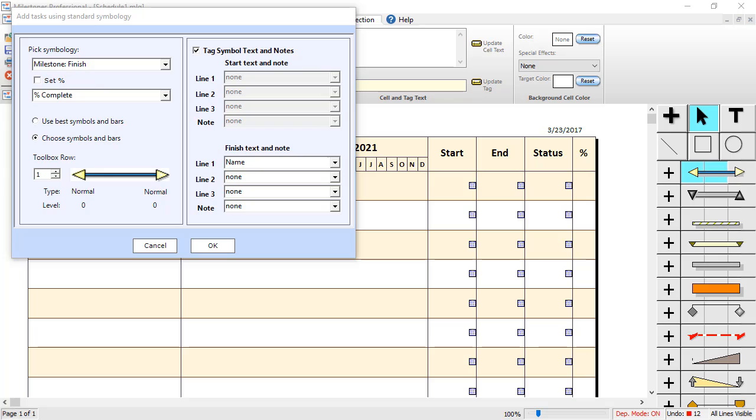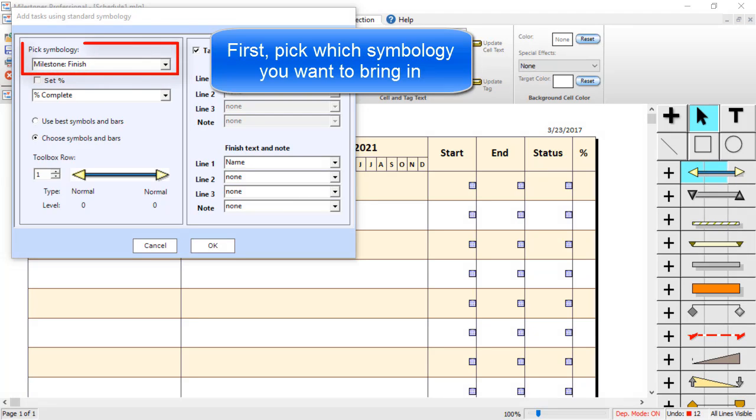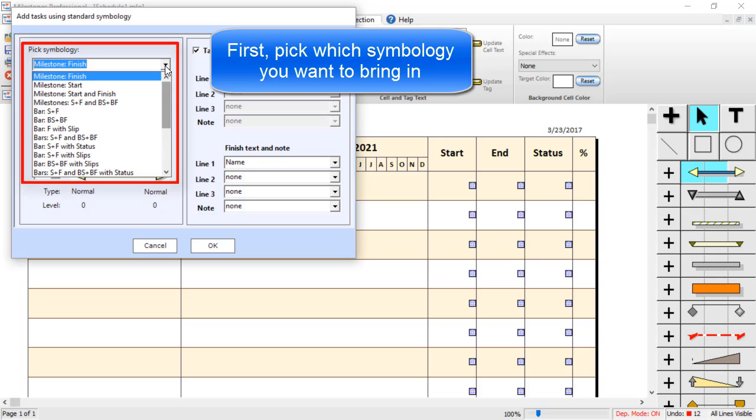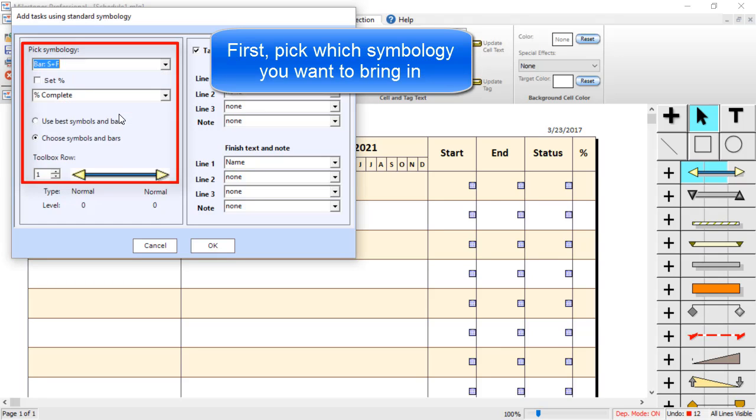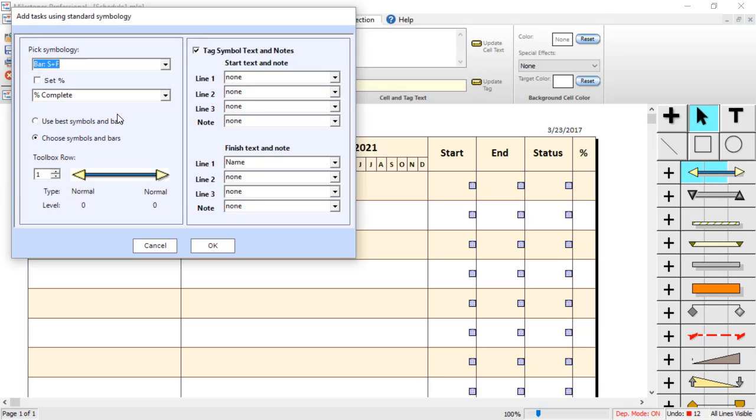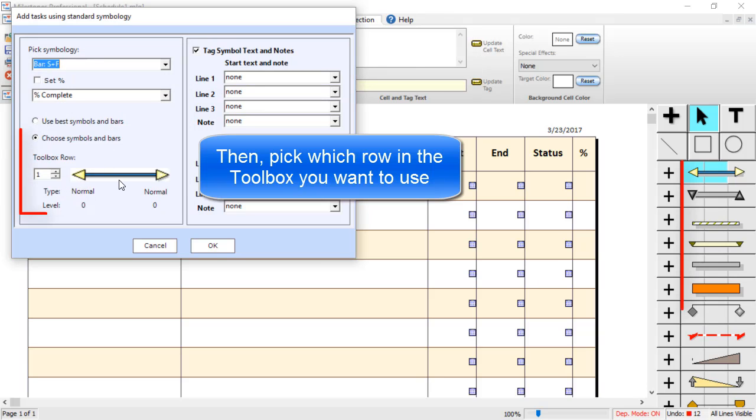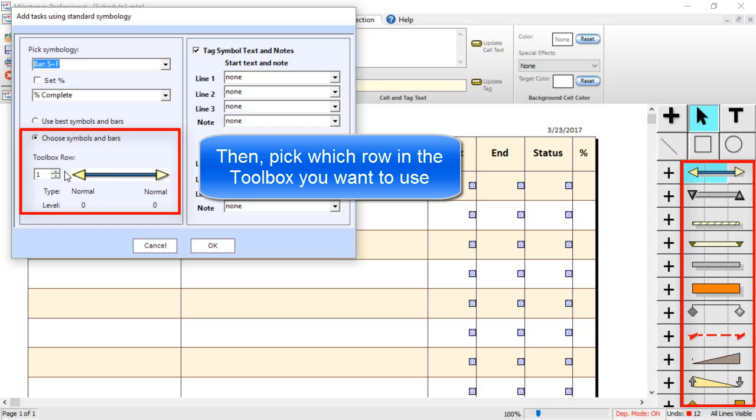Now we can pick which type of symbology we are going to use for that task. So for the symbology, I am going to choose Bar S plus F, which means Start and Finish. So it is going to bring in a bar representing that project task and it is going to use this Toolbox Row down here.